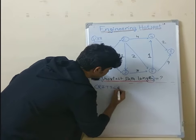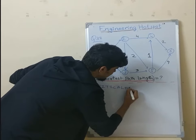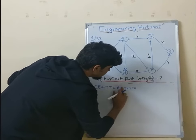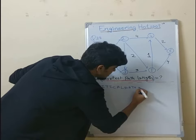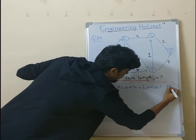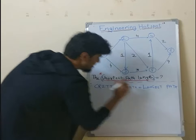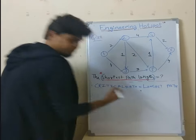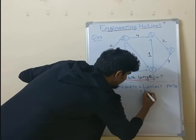Let me write for you: Critical path is equal to longest path, which is also equal to minimum time.